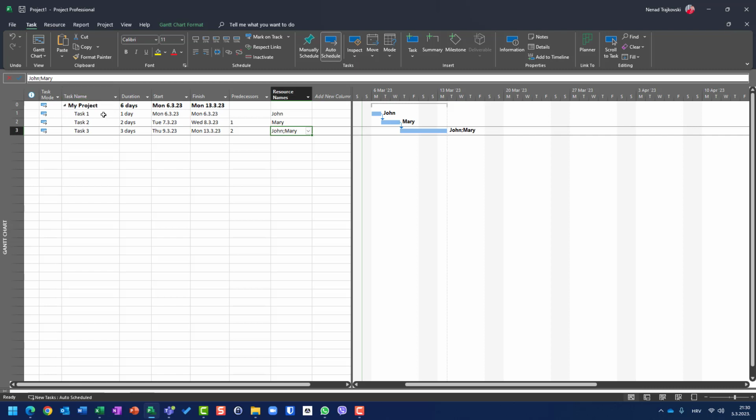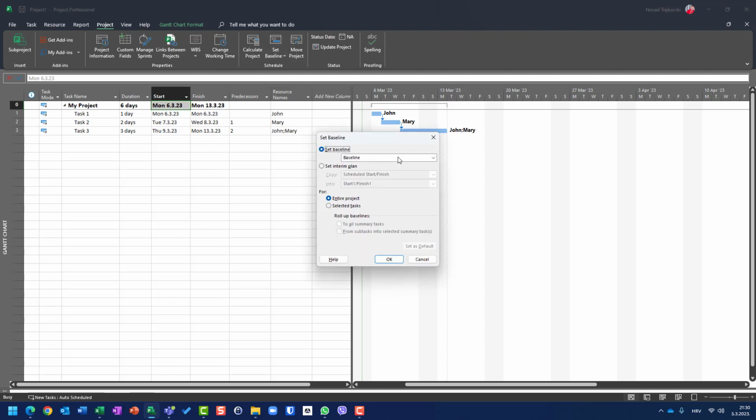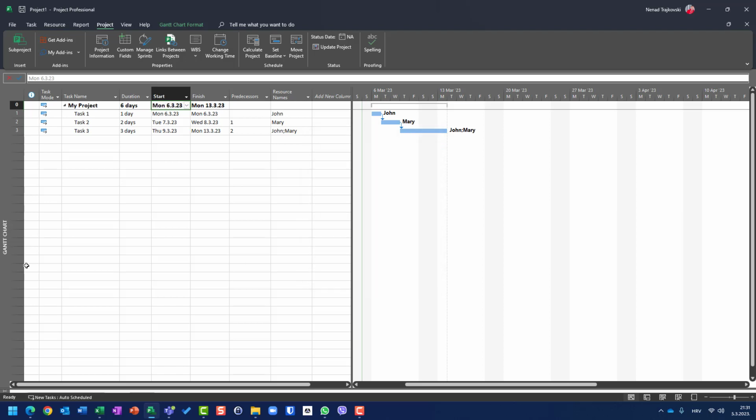So I have 3 tasks, and the whole project is supposed to start on Monday 6th of March and to be finished on Monday 13th of March. And this is my plan, and I'm going to Project, Set Baseline, and I will choose that baseline, and I will say, okay, I want to save it.